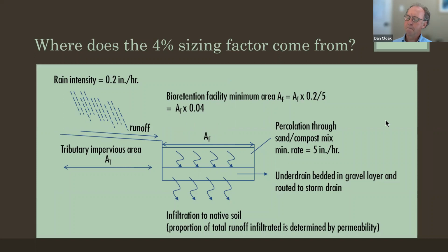And it's also not a huge economic burden, because first of all, building bioretention facilities at 4% on development sites is not a huge portion of the overall cost of construction on the projects to which this applies. And with proper design, it can almost always be achieved without reducing the uses of the site.